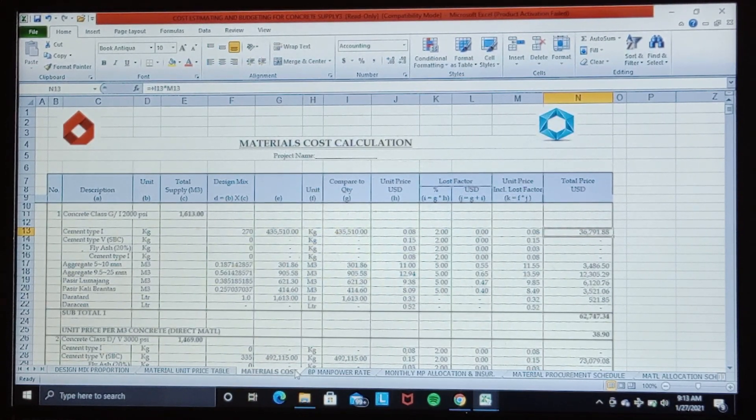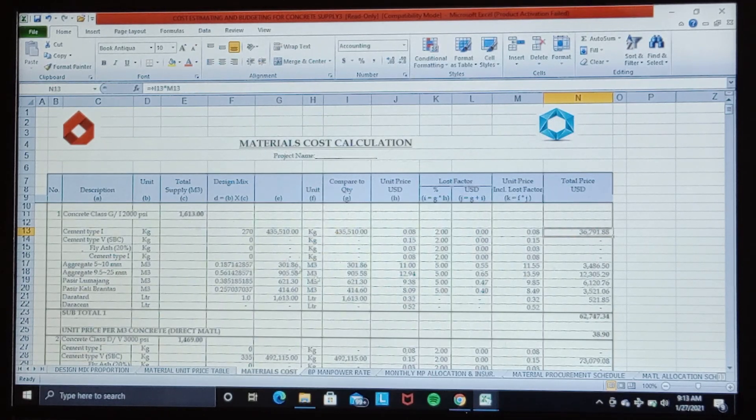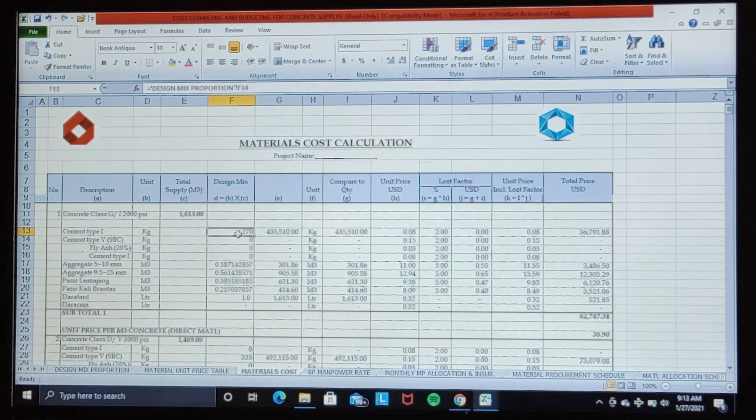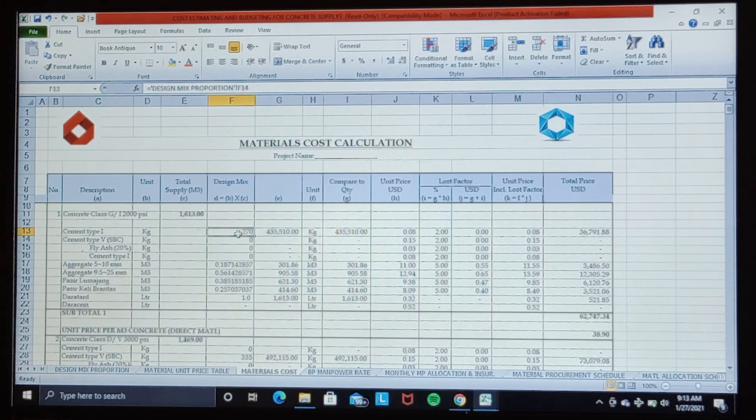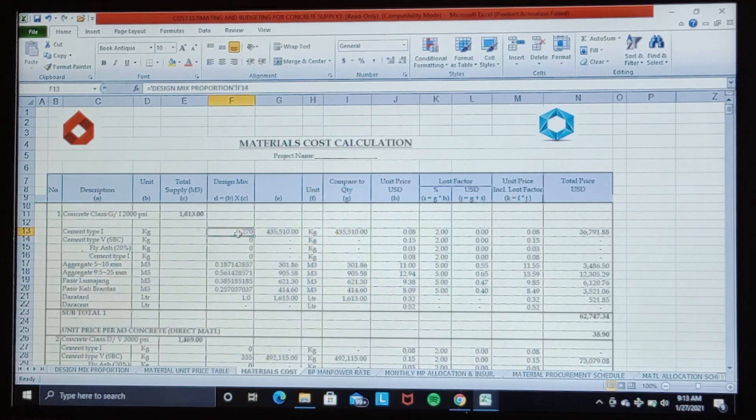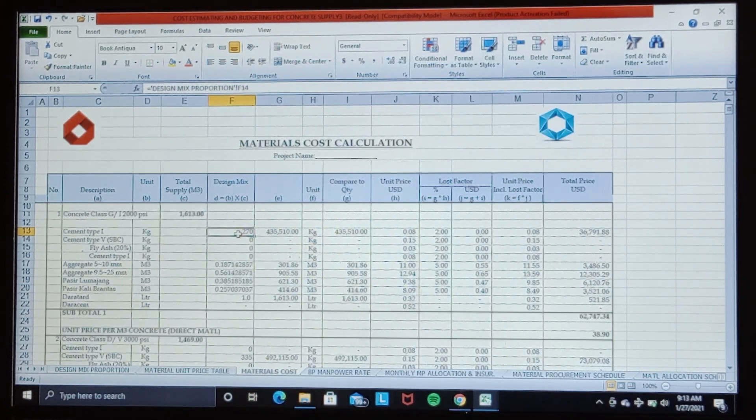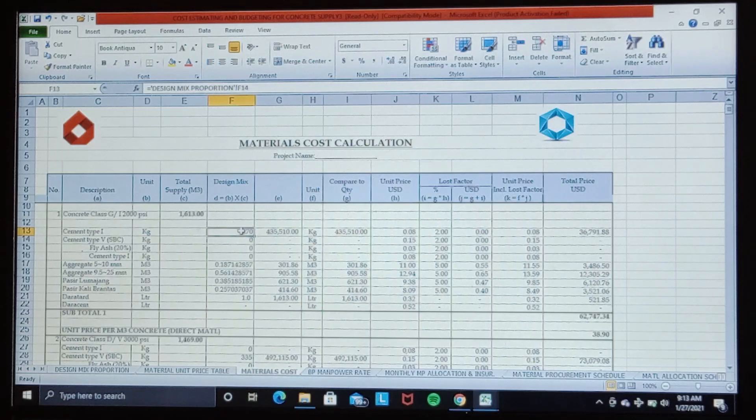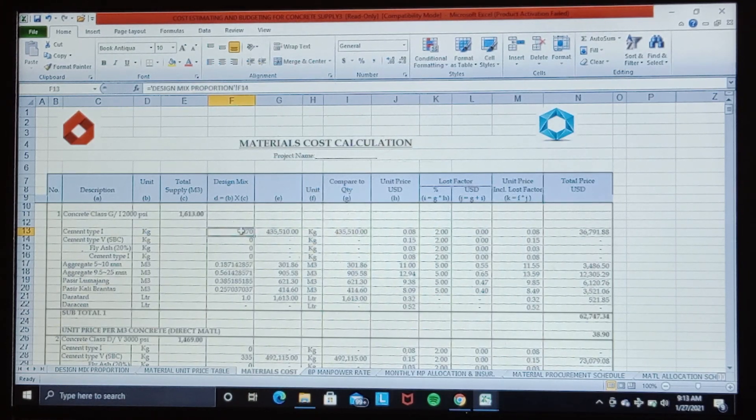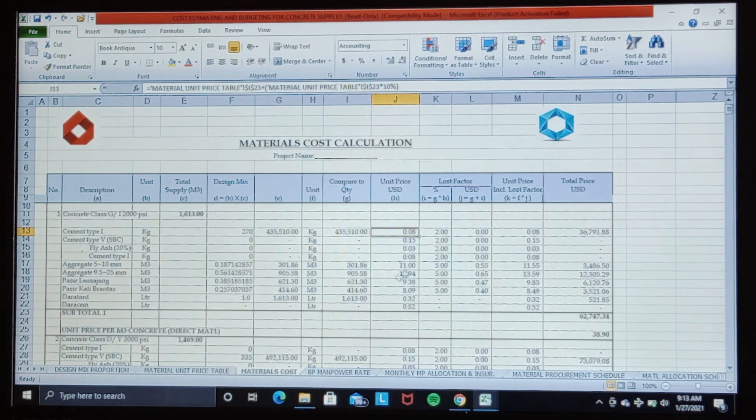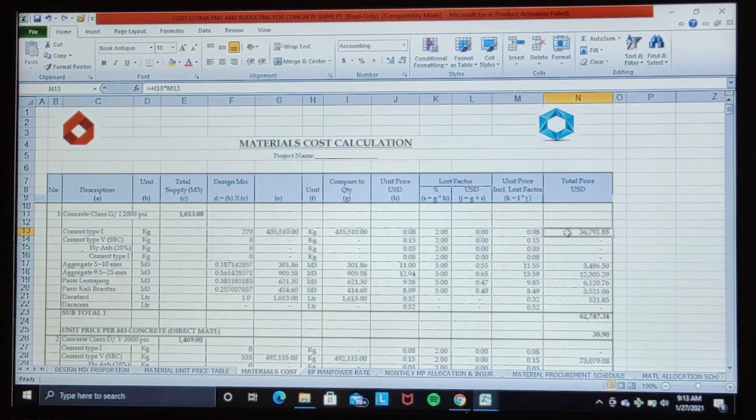The calculation of the total material is found by multiplying concrete quantity per class by material required as each concrete mix design, then we multiply by the applicable unit price of each material. Then we got the total price here.